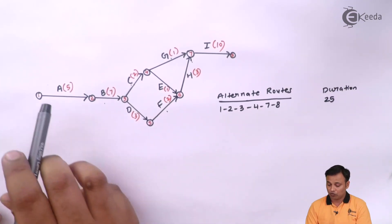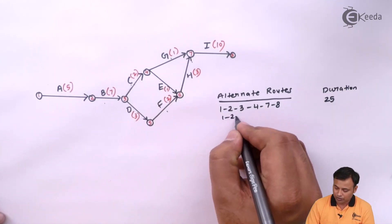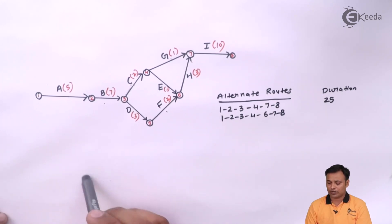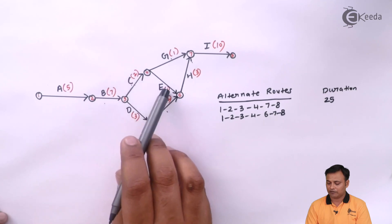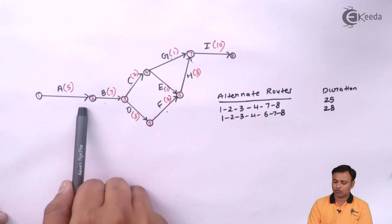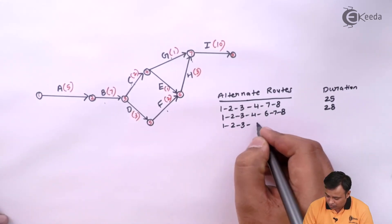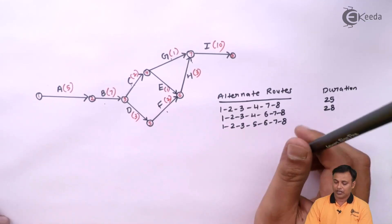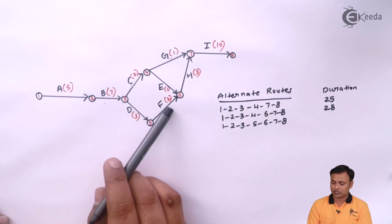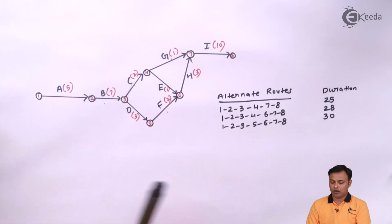Route 1→2→3→4→6→7→8 gives a duration of 28. One more route is 1→2→3→5→6→7→8, with durations 5+7+3+2+3+10 = 30.